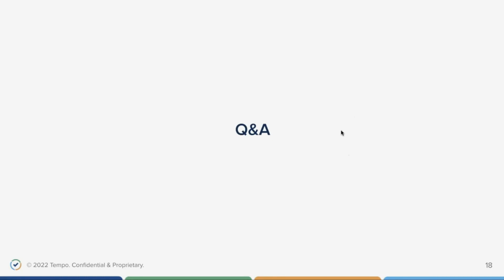Thank you. All right. Susan, this is more of a feature question. When importing from Jira issues, what dates does Tempo assign the hours to? Is it based on the start and due date of the issue? Tempo does calculate from the due date and back. So let's say your work hours per day is 4 hours and the due date is on Friday, and the whole plan is 16 hours, then when you import, the plan will run from Friday backwards, 4 hours per day, up to I think Tuesday. So that will be 4 days times 4, that's 16. So we use the due date as the basis, together with your availability, to create the plan when you do the import from Jira.